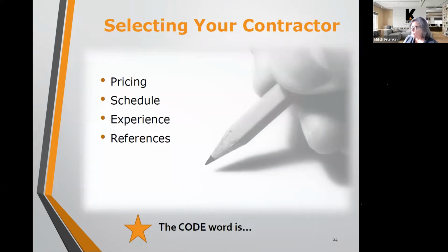Our proposals say that we'll put out to a minimum of 3 contractors. I was just telling a potential client last night that I generally put RFPs out to at least 5. The reason is getting back timely bids. Pavement contractors are very, very busy people, so trying to get timely bids can be a little difficult at certain times of the year.